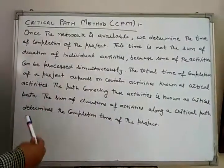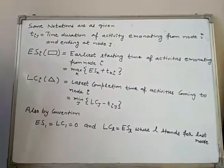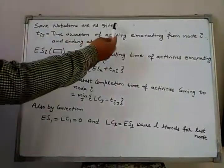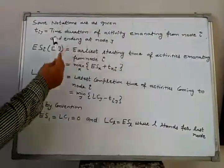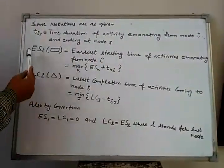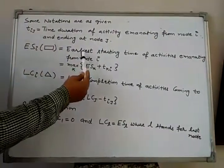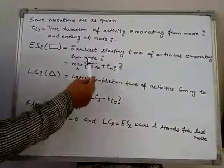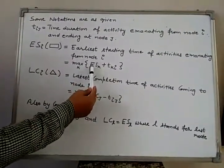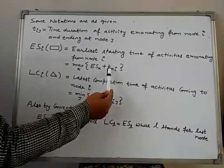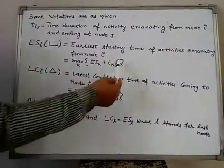Now we will discuss how to find the critical path. Before going into the discussion of critical path determination, let's first define some notations. Tij represents the time duration of the activity emanating from node I and ending at node J. Then, capital E capital S I, represented by a rectangle, is the earliest starting time of activities emanating from node I. Mathematically, it is calculated as the maximum over K of the earliest start time of the Kth node plus the time duration of the activity emanating from node K and ending at node I. This will be explained in the example.